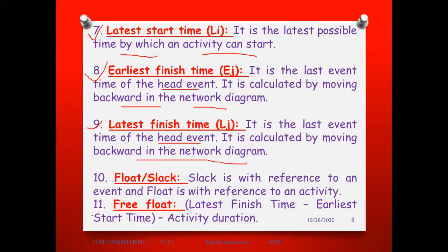Okay, now the next term is float or slack. Slack is with reference to an event and float is with reference to an activity. So with reference to an event we call it slack, and with reference to an activity we call it float, right?